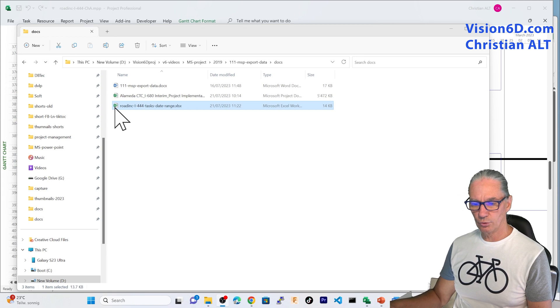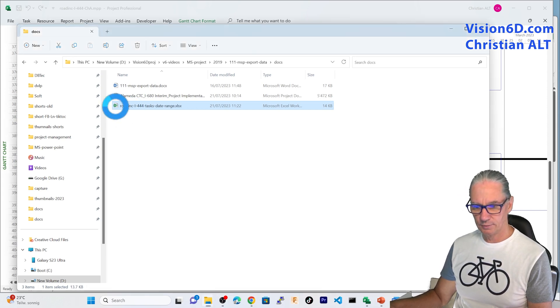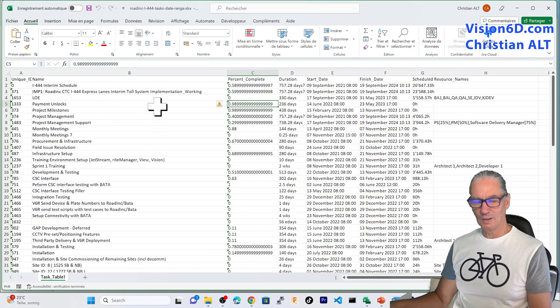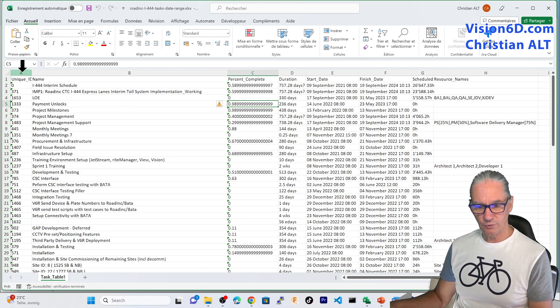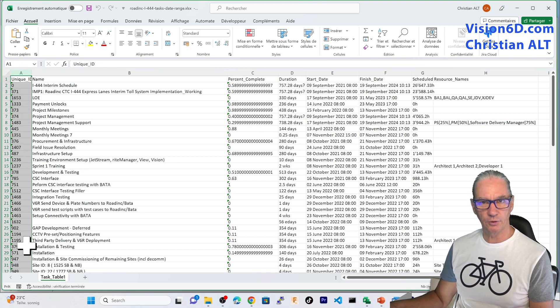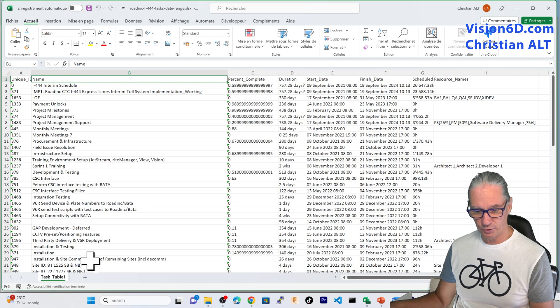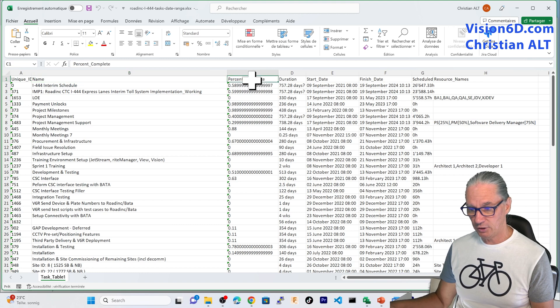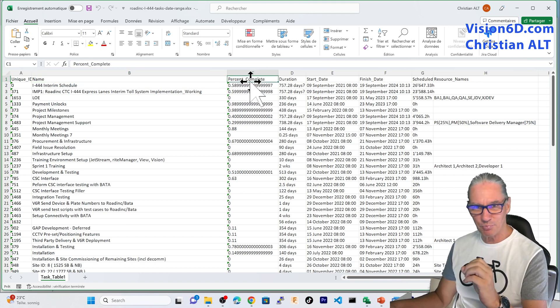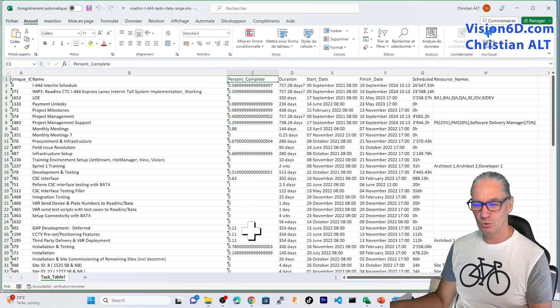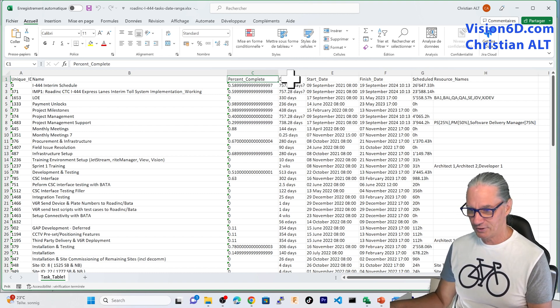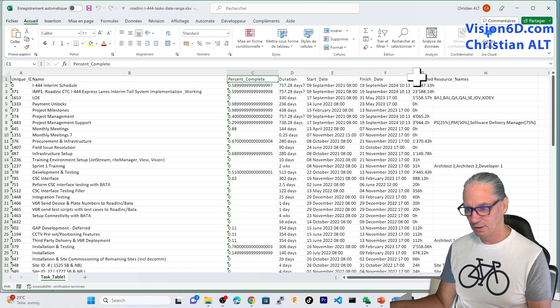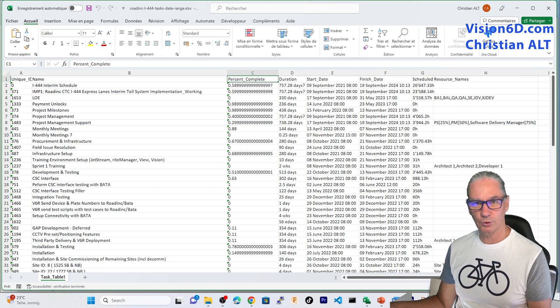So, I'm going to open the Excel file in which I have the result. And we see that the result is here, is defined. We're finding the first column the unique ID. You see that it's not numbered in a row, but it's really a unique ID, as I explained. We have, after here, the description of the tasks or the task names, if you prefer. Here, I have a really, but really extremely precise percentage completion. This is due to the export. But, of course, this precision, we don't need to use it. After that, I have the initial duration, start date, finish date, and scheduled work, and the resources that worked on this.